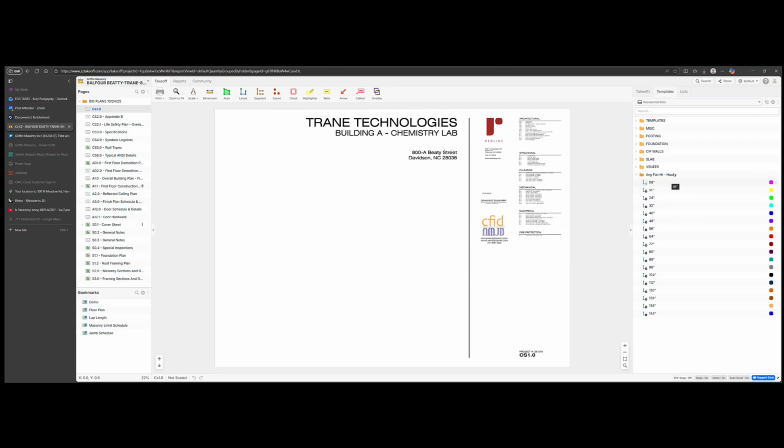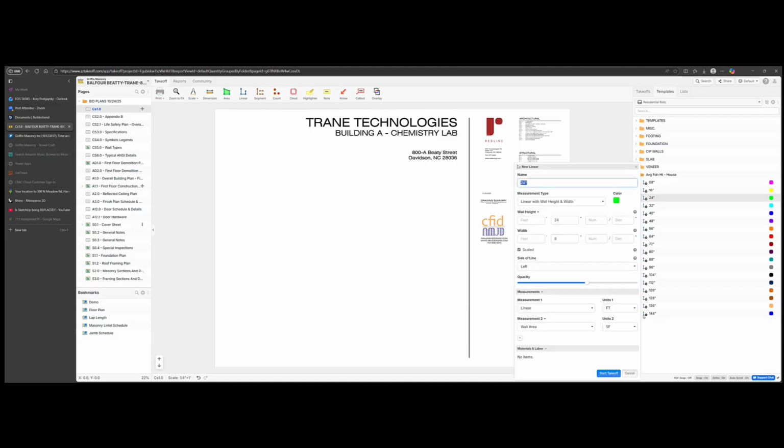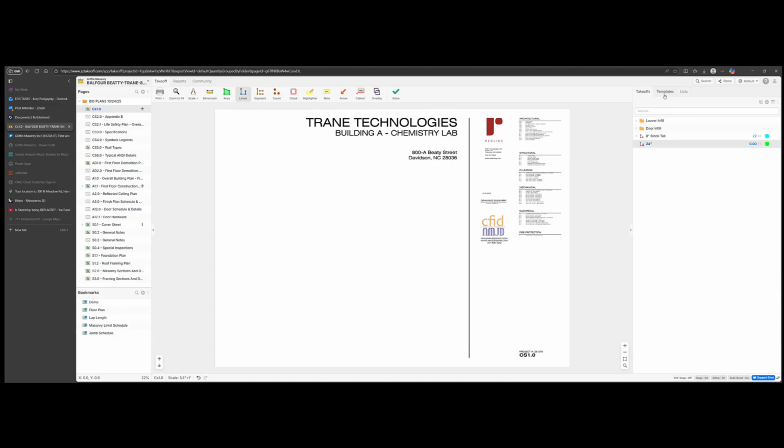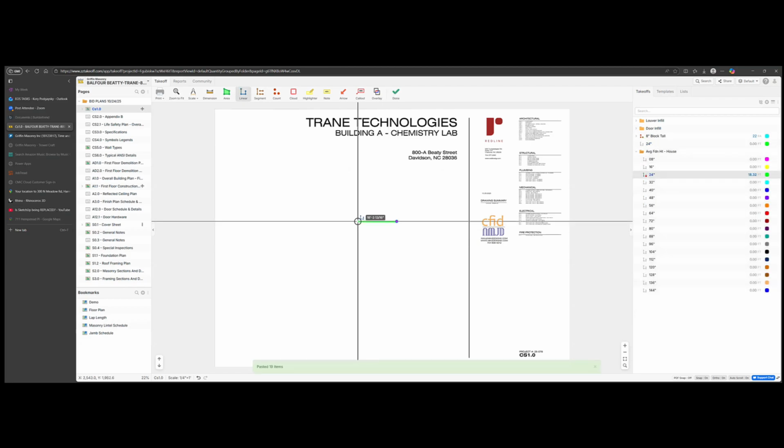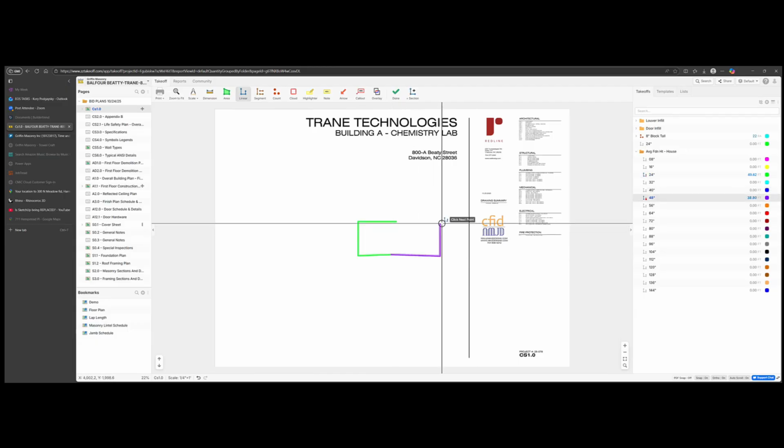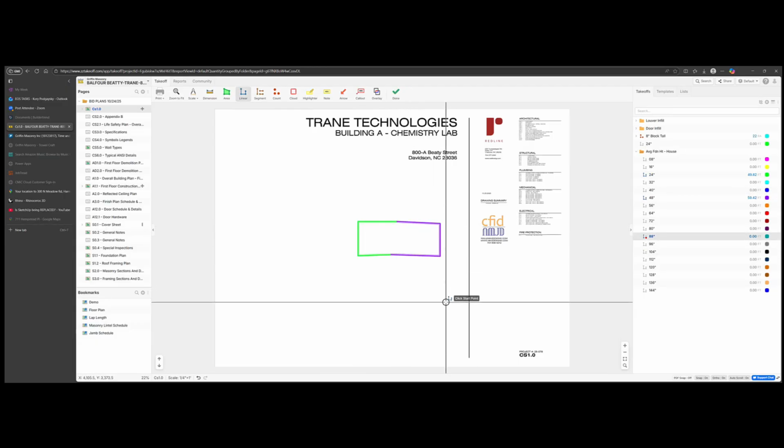Yeah, we also are building out other little tools in here, like we use this for our invoicing as well. We might build a foundation for a house and we'll price it out as a 40-inch average. And then once we go out there and put the footing in and determine where the footing steps are at and what the actual foundation height is, we'll come back in with some kind of tool like this. Actually have it in a folder like that where we'll trace out the foundation and say these walls are all 24, 48, and I don't know, a wall over here that's 88.